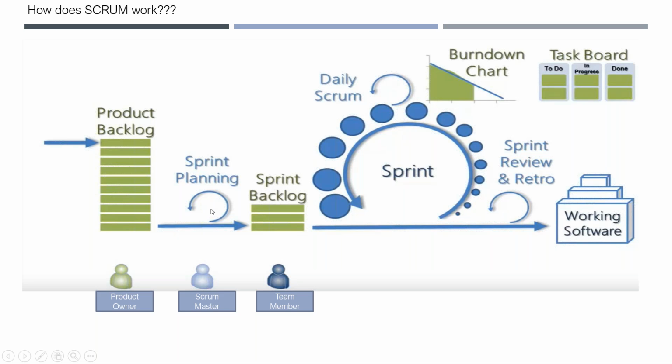For the sprint planning, the prerequisites are, you need to define the sprints, right? How many sprints you need, what is the start date and end date for your sprints, etc. You need to do that. And also you need to have the team members, right? So it's not an Excel sheet now. In an Excel sheet you can simply go and add a name, but that's manual. You need to define the teams in the tool.